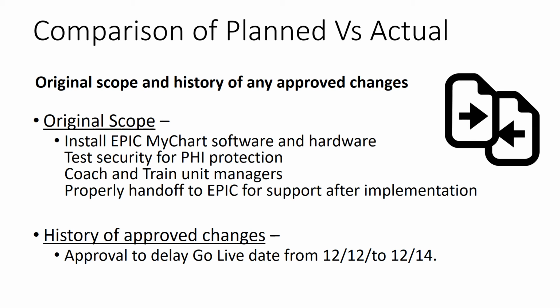Additionally, the original budget versus the actual cost of completing the project: the original budget was $579,200. The actual cost of completing the project has come out to $546,000. So although we've been about 2 days behind, we are under budget.